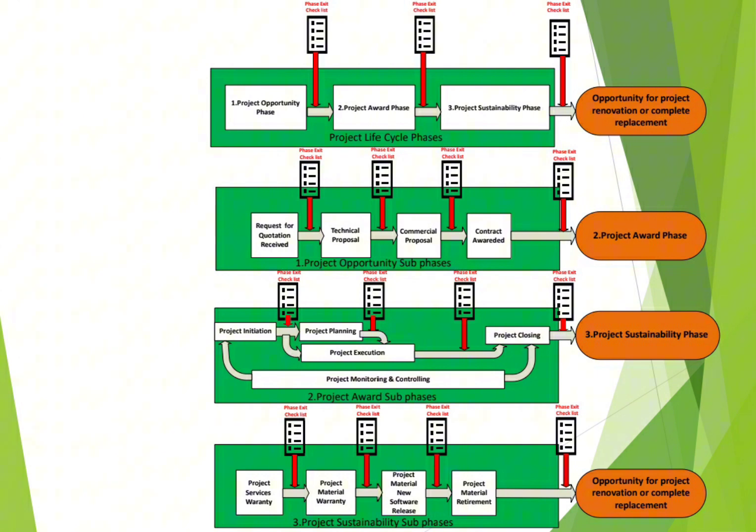Also, you need to revisit your risk management plan. During the bidding stage, a list of risks was identified with ratings for these risks. This needs to be revisited again, and adequate risk responses should be in place so as to monitor these risks and act accordingly as per the risk response plan.